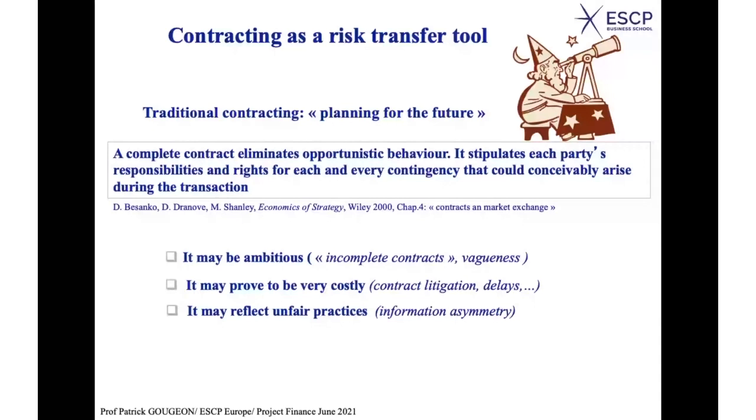So to start with, the facility manager will sign a contract which looks very cheap. In the end, you will spend a lot of money with this facility manager, because he will come to you and tell you, yes, but this is not in the contract, remember, and you should do it, and you will have to do it, and spend more and more money. He knew from the very beginning that you would have to do that, but he didn't tell you, because now he's making more money. He's taking this as an opportunity for making money.